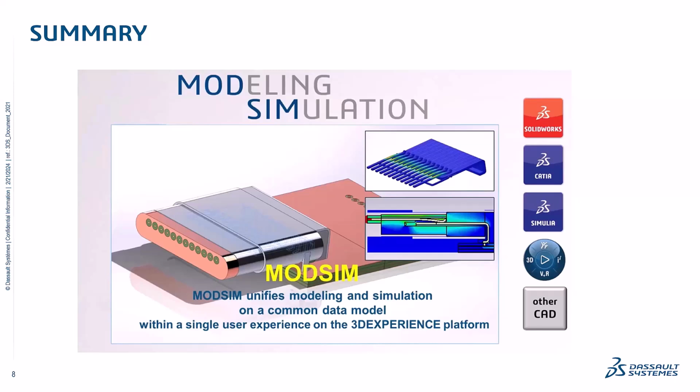And I think having that common data model is really the key here, because everybody's working off the same model. When you transfer files, it's very hard to maintain version control. Very difficult to do that. You number, you change the file name to include numbering and so on, but in the end, things get lost or misplaced, or somebody misunderstands an update. So having that common data model, I think, really is a key feature here to maintain synchronicity across the whole project.